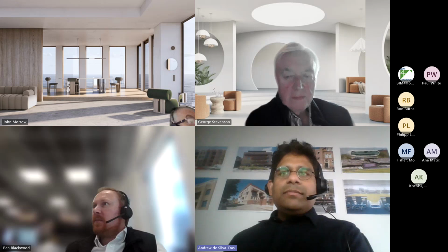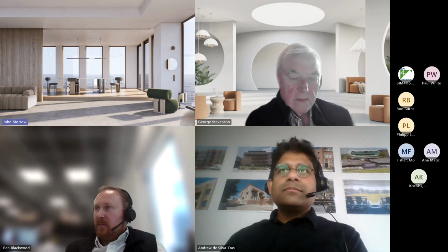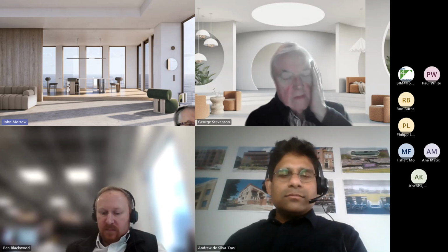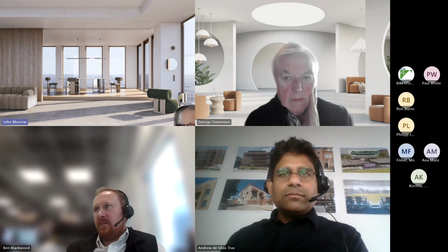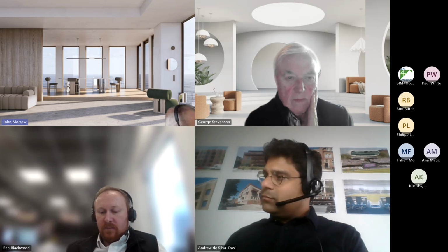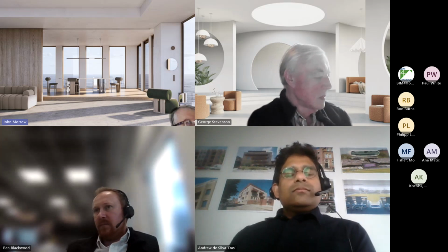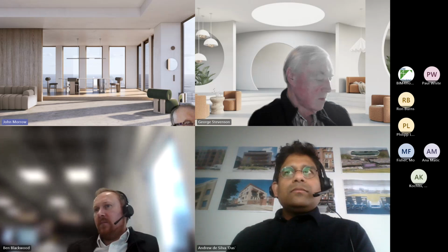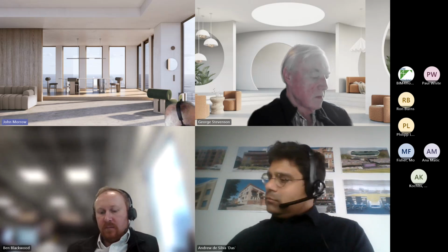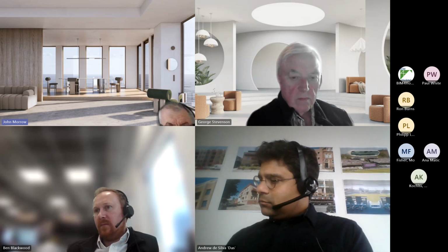John, sorry, you had your hand up. Yeah, it was just in regards to that process. It's especially difficult collating the regulation 38 items on section 106 schemes where we've come to the table quite late in the construction phase. But we utilize what we just call a regulation 38 tracking document to record the gathering of information and the review and the closeout, and get as much done as we can when we get it. That's the only way we found that we can audit that review process to make sure that everything is in order at PC.